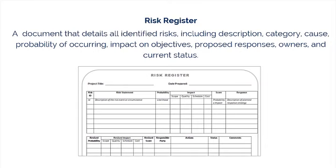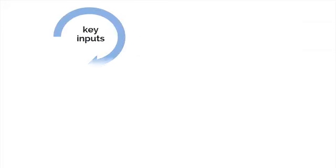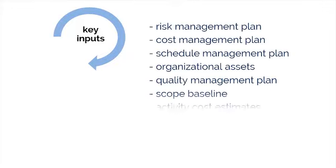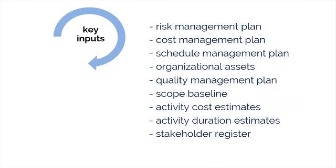The preparation of the risk register begins in this Identify Risks process, and then it becomes available to other project management and risk management processes. Essentially, we are continuing to add information to the register each time we go through one of the processes in risk management. The inputs for the Identify Risks process are numerous, as you can see here, and to be sure, you have seen some of these inputs before.